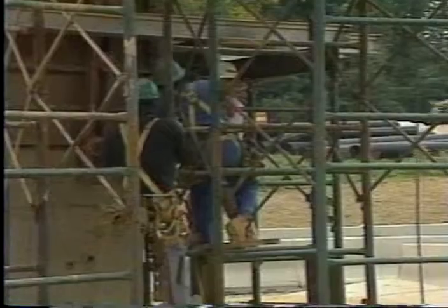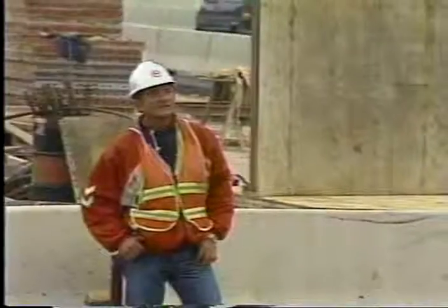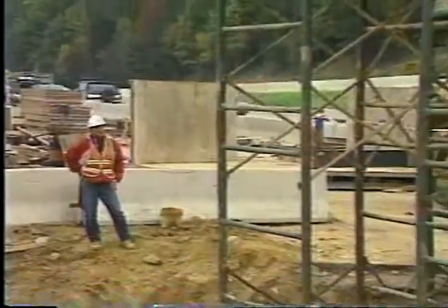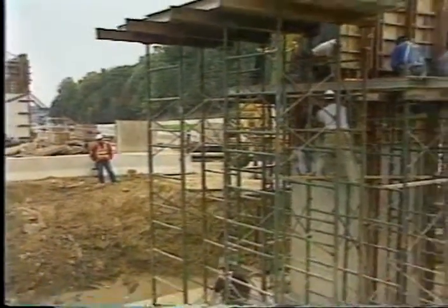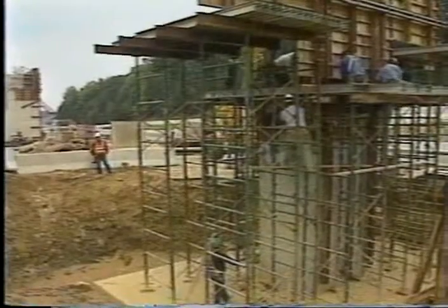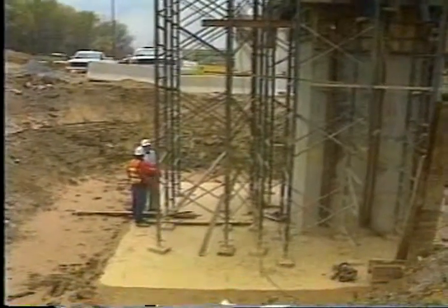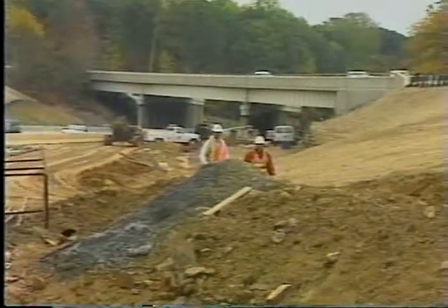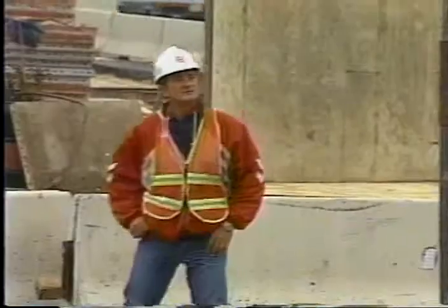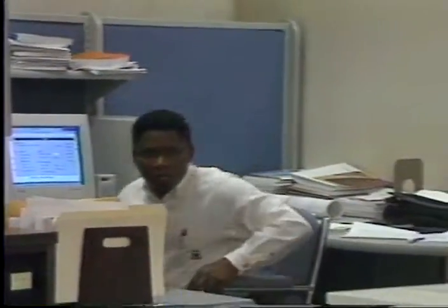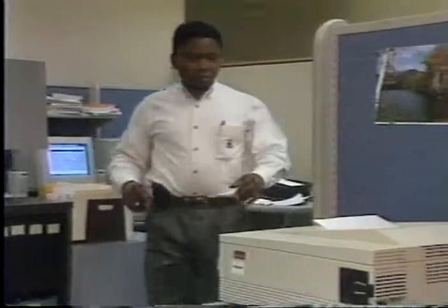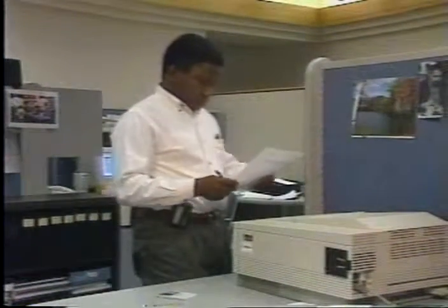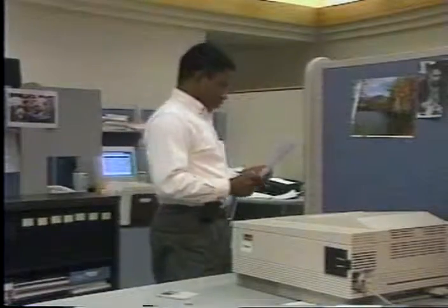Monitoring requires evaluation of the man-hours used and the work accomplished. One method includes comparing the actual man-hours used versus the total planned. Another involves comparing the contractor earnings versus the total contract cost. A third method involves comparing the percent of contract time used. Man-hours comparisons may be tabulated by planning activity, staffing activity, contract, or a group of contracts.